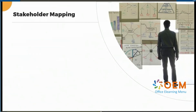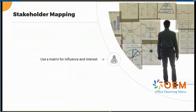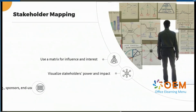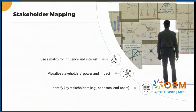Following this, we will explore the second stage of our process: stakeholder mapping. This visual tool helps you identify and categorize stakeholders based on their influence and interest in the project. Stakeholder mapping typically involves creating a matrix with influence on one axis and interest on the other. Stakeholders are then plotted on this matrix, allowing you to see who has the most power and who is most affected by the project. For instance, in a software development project, high-influence stakeholders might include the project sponsor and key clients, while high-interest stakeholders could be end users and customer support teams.